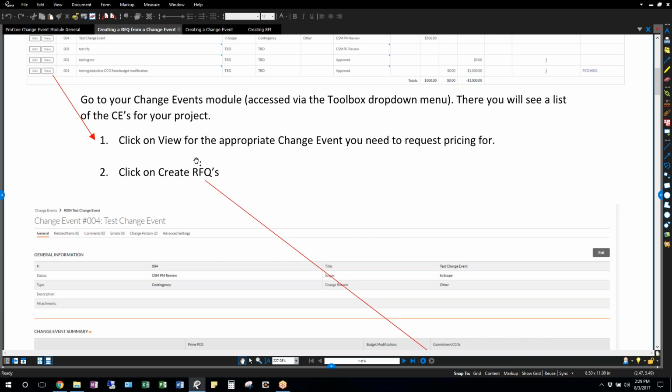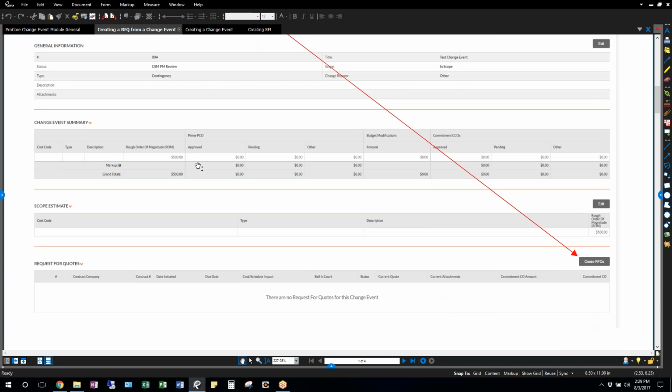Okay. Well, in lots of cases, you might have a bulletin where half of the work might get approved, and they might not go forward with some of it. So you have to go back and modify the CCD for the portion of it that was approved.